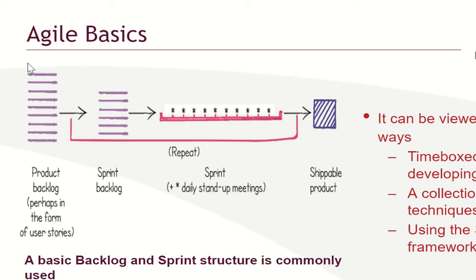As far as Agile is concerned, one of the advice is to always meet every day for at least 15 minutes. They call it daily stand-up meeting. 15 minutes, ideally, though sometimes it can be up to 30 minutes, or even 5 minutes.